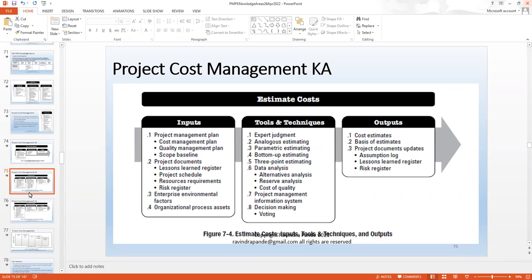Now, it's a normal guideline that whatever estimation methodology or estimating process you choose, you stay strict with one, because otherwise the estimations coming from different processes can be a bit different. In that scenario, if your baseline varies, it's difficult to track the project on a single estimating process group. That's why we normally keep the estimating process group constant.